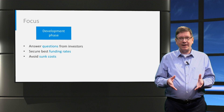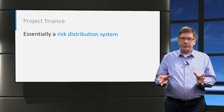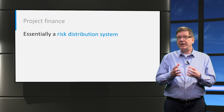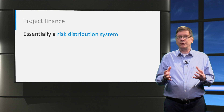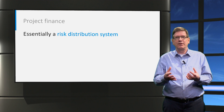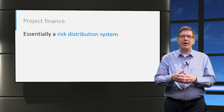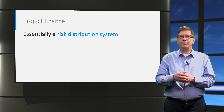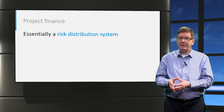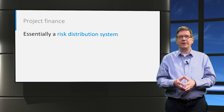Project finance is essentially a risk distribution system. All the risks that are retained by the project company — by the SPV — will increase the funding costs or may even make the project financing fail. So we go to great lengths to allocate risks to other parties, trying to move them away from the SPV to a party that is best able to assess and manage that particular risk.